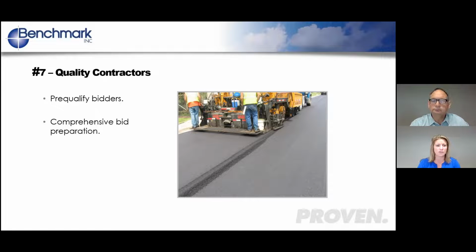Quality contractors also allow you to have a comprehensive bid preparation. When we talk about that, we think of contractors who are committed to asking questions, contractors that are willing to review the plans and specifications, and attend on-site pre-bid meetings. That is critical. Basically, making sure that the contractors bidding on your projects are willing to do the homework that's needed to ensure that they understand the project scope.